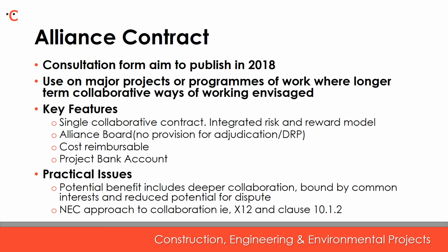A couple of key features include the management of the alliance contract by an alliance board, the alliance manager carrying out the role essentially of the project manager, and is intended to be concluded on a cost reimbursable basis, i.e. defined cost plus fee, similar to option E.